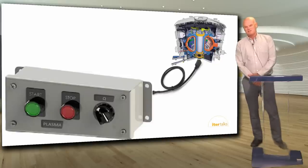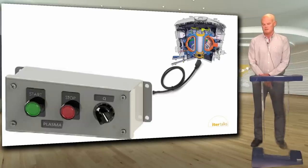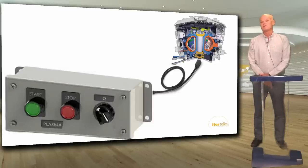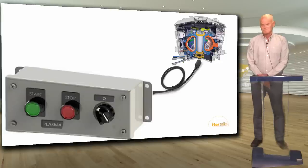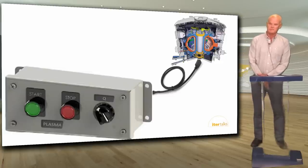It's actually very common in many projects that the control system is forgotten until the last late stage of the project, and this causes long delays to the start of operation. Remember, without a control system, everything else is useless. Think about your washing machine at home — what would you do with it if you didn't have a start button?